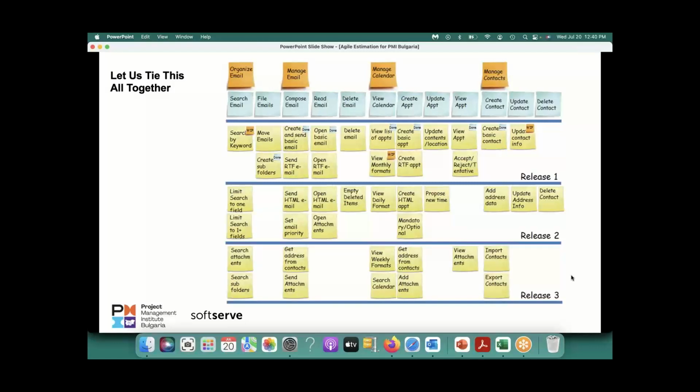Okay. So what you do is you talk to the team, and maybe if they are not very comfortable remaining at the story level, you can break into tasks and then have your capacity plan done, who is available for how much and all that. And based on the task estimate and based on your capacity planning, you can come back and say, okay, how many stories we can finish, and this will be your estimate, right? This will be your estimate. So you can do that, and maybe it comes, I'm just picking up a number, 30 story points. Okay, that's what you have.